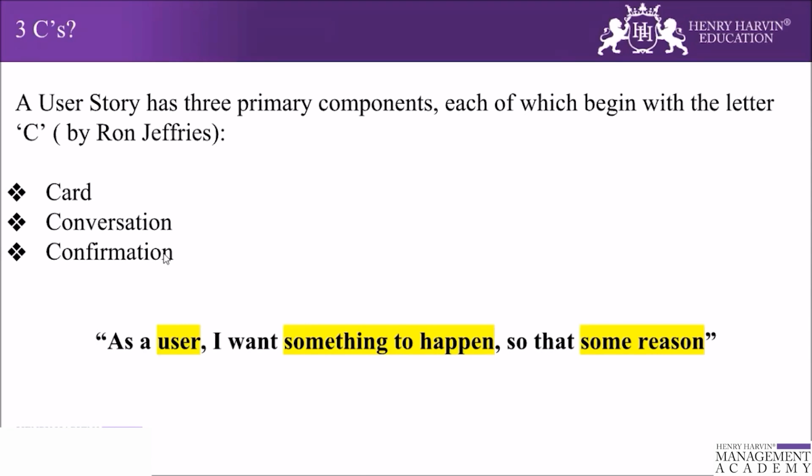So the team and the product owners check the doneness of each story in the light of the team's current definition of done. What happens is that specific acceptance criteria, written from the current definition of done, can be established for individual stories. But the current criteria must be well understood and agreed to by the team. All associated acceptance tests should be written in the passing state.